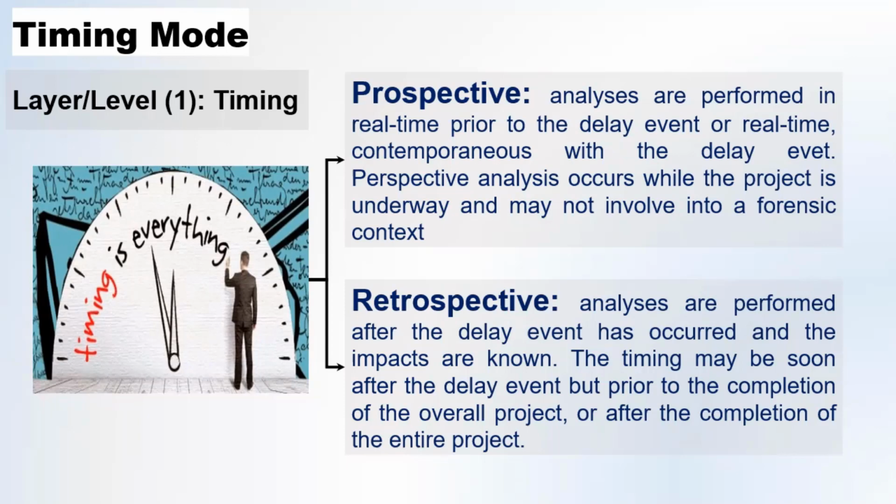And in some professional communities, when you say time impact analysis, those who are working in data analysis in this professional community will understand that you are talking about prospective analysis. The retrospective analysis is different. We have multiple methods, and this will go to another layer of categorization in the coming slides, by which we are going to choose our methods that will come in our 5 examples.